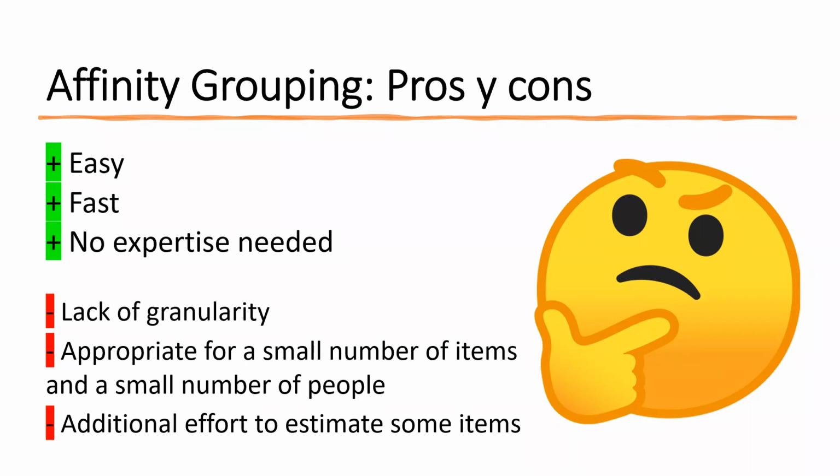And I agree with what Yury said about logging the actual time it takes to do the job for a particular item. Logging is a really good practice, and then you could have the data on variance and accuracy, as Yury said. Those metrics could be used to further adapt your estimation criteria. So that's really a good practice to do, especially for new teams.